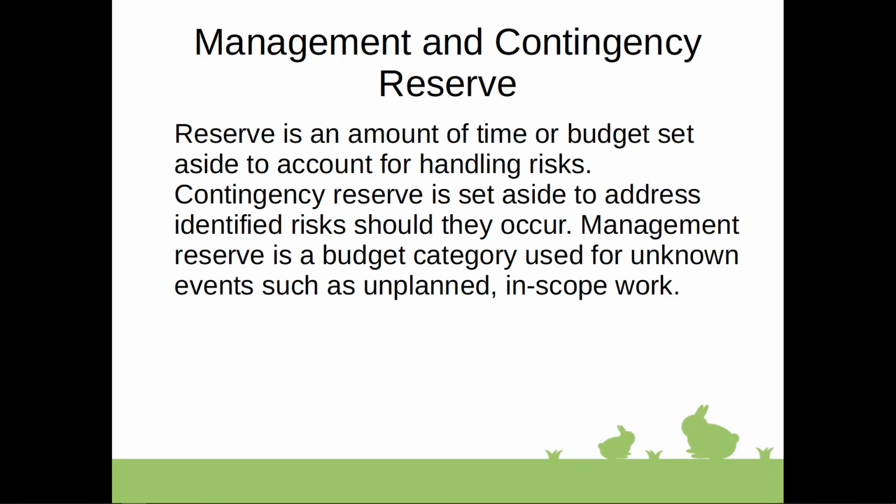However, having contingency reserve to address identified or unidentified risks should be available in case these risks happen. Contingency reserve is set for identified risks, and management reserve is set for unknown events, including unplanned activities that still cover project objectives and are considered in scope of the project work.